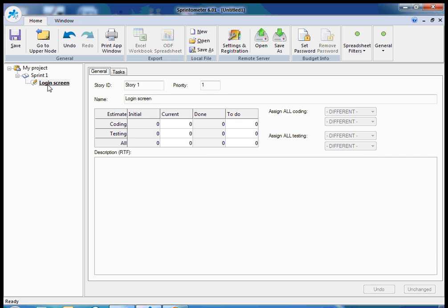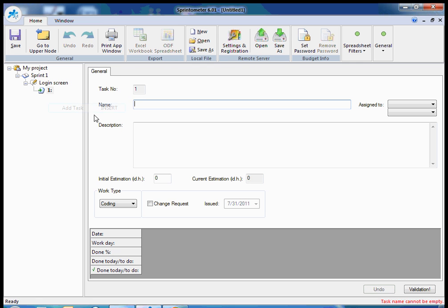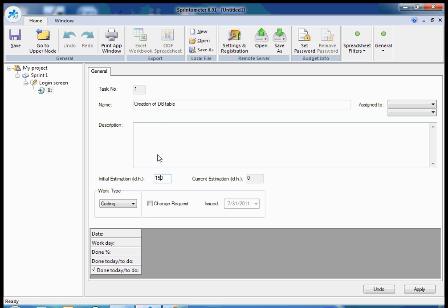And finally for the user story I should add development and testing tasks. For example, creation of DB table to store information about users and I should provide estimation. For example, 15 ideal hours coding, and the estimation should be obtained during sprint planning session by planning game.